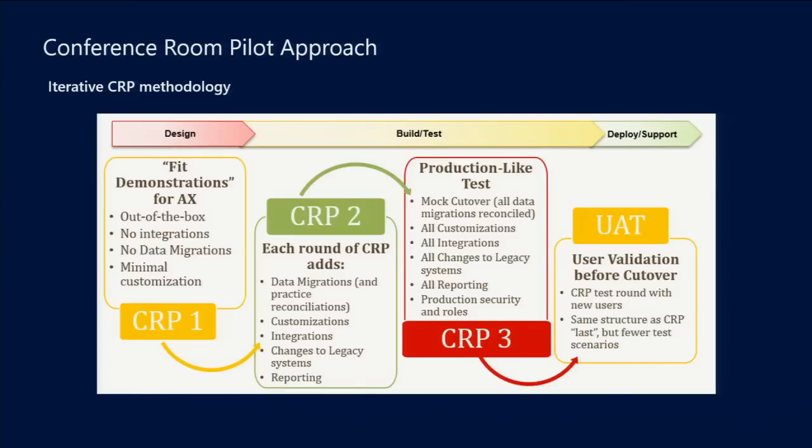Now, I don't want you to think that there's no documentation associated with this. When people hear me talk about conference room pilot, when they hear me talk about agile, they're suddenly, okay, there's no documentation, we just run in and build it and we present it and we're all happy. I want to be very clear that no, that's not the process. The process is exposing the product, documenting those business processes using LCS, BPM as a tool to support it, iteratively then demonstrating that back through segmented conference room pilots to show your progress.